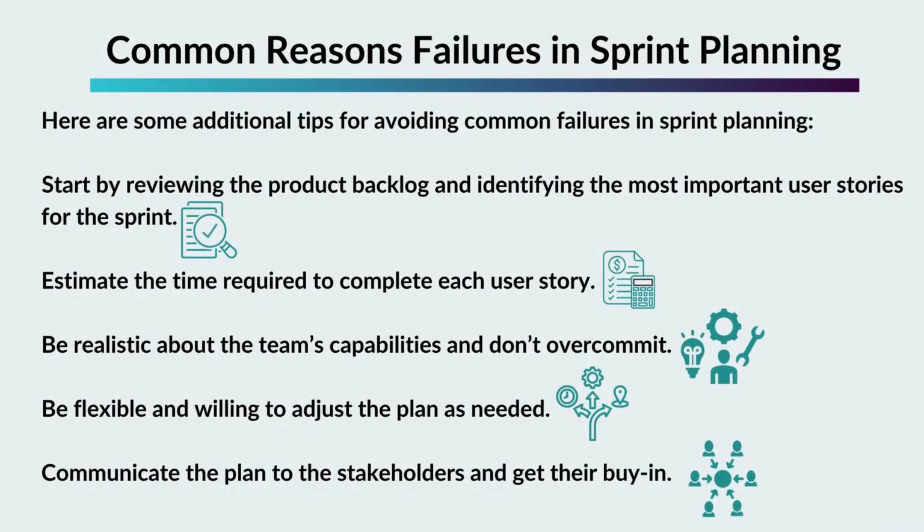Start by reviewing the product backlog and identifying the most important user stories for the sprint. Estimate the time required to complete each user story. Be realistic about the team and capabilities and don't overcommit. Be flexible and willing to adjust the plan as needed.